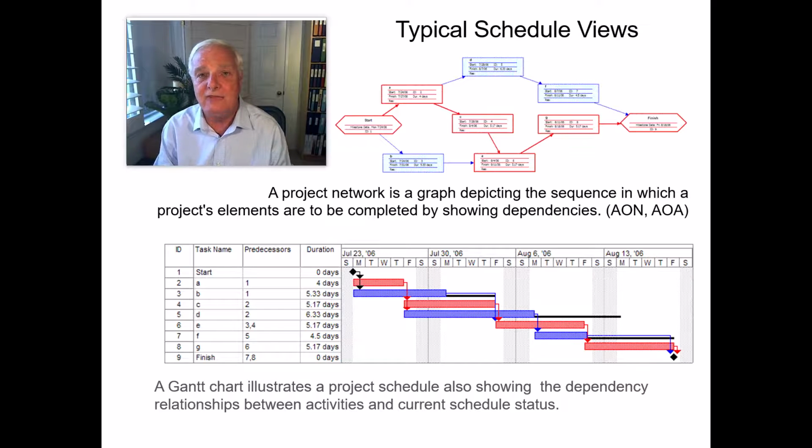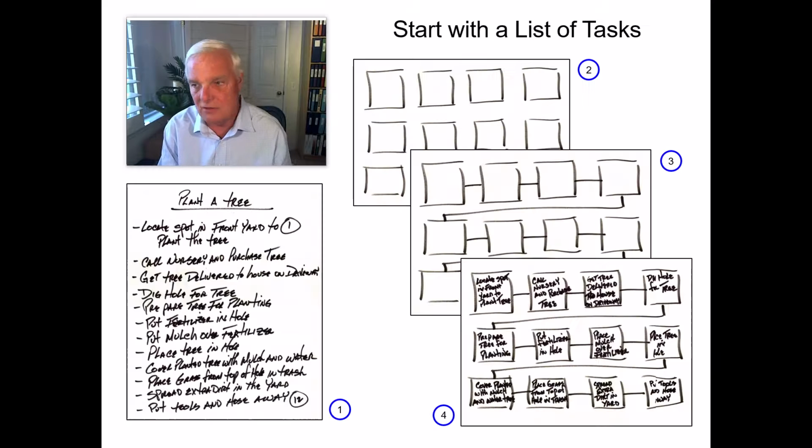Now, the critical path is just the longest path through the project, but many times we get tied up and we think that that's something that we really must micromanage. I don't want you to micromanage, and I don't want you to microschedule the critical path. What I want you to do is take a peek at that network diagram we've got there also. Now, the network diagram illustrates where we have intersections. That's where you have two elements that come together. Those are problem points, and those are typically areas that I would tell you that if you've got a schedule on a project and it seems to have some risk associated with it, this would be a great technique to work with.